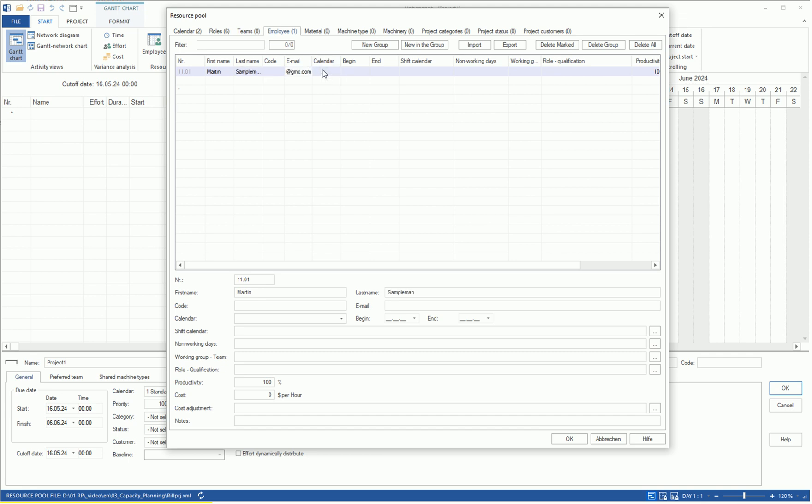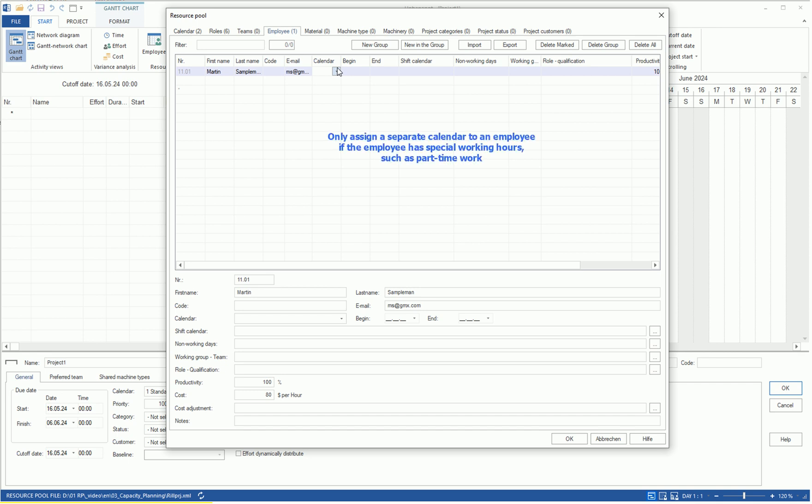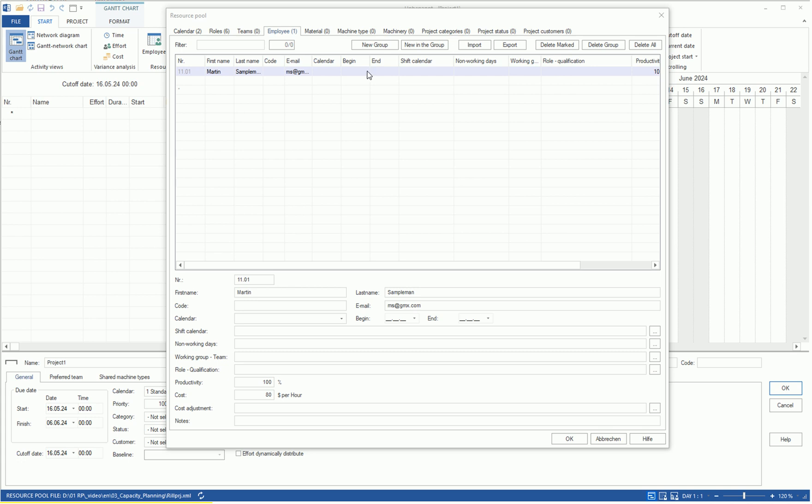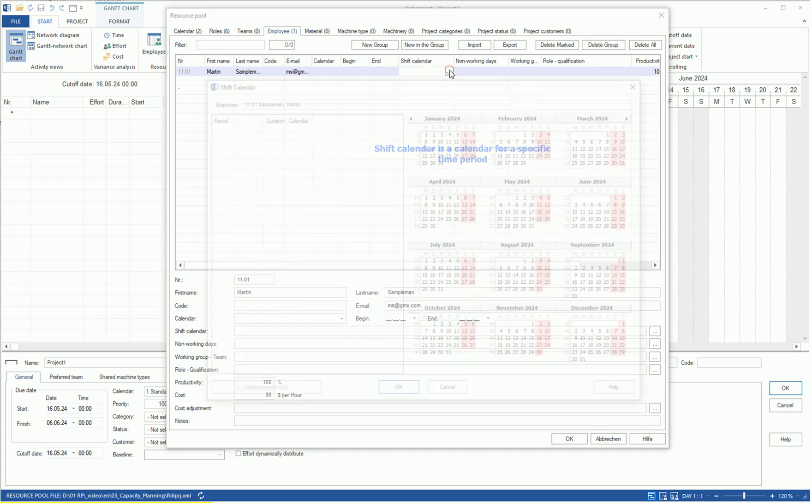We leave the calendar column blank, which means that employee Sampleman does not have his own calendar and works according to the project calendar. You only assign an individual calendar to an employee if they have special working hours, such as part-time work. If you want to assign a calendar to an employee for a specific period, click on the three dots in the shift calendar column.